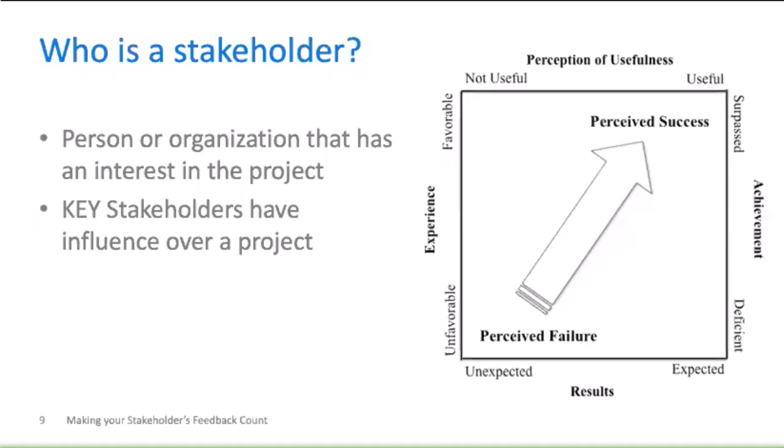A key stakeholder or key stakeholders are the person or persons who not only define what success looks like, but they also validate at the end of the project that the outcomes of the project are what meets their needs. And I always remind project managers that a successful project at the end, at the outcomes, equals the baseline that you've set with your key stakeholders, plus all the approved changes throughout the project. That is what leads to successful outcomes.